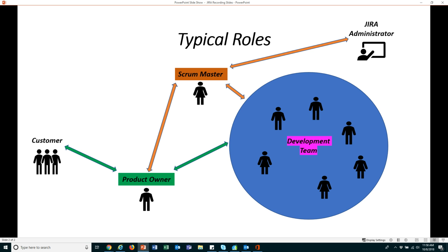Is typical. Anytime you fall below five, sometimes the team will be less than optimized. If you go above 8 or 9, the team can also be less than optimized. So the good rule of thumb is that 2 medium pizzas should be able to feed your team lunch. So that's one that's been out there for a while. I highly recommend that you follow it.